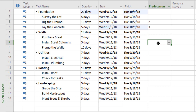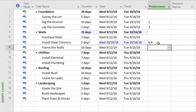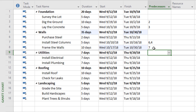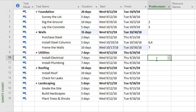For the walls: purchasing steel could be done at the start of the project with no predecessor. Installing the steel columns actually has two predecessors — we have to purchase the steel (number six) and we have to lay the concrete (number four), since we can't install steel columns until the concrete has been laid and cured. Framing the walls can't happen until we've installed the steel columns, so its predecessor is number seven. For utilities, installing electrical and plumbing both require framing the walls first, so their predecessor is number eight.